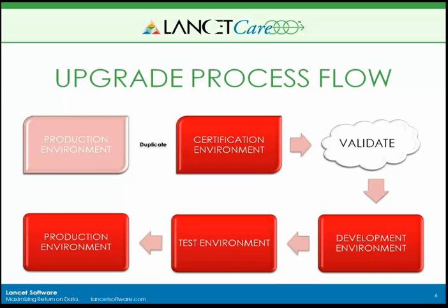So at this point, you need to be in a development freeze where no objects are moving from dev to test to prod. So you think of it as, you upgrade development, and the freeze starts. And then however long it takes to validate the development environment, you step through upgrade test, validate that environment, and then once you upgrade and validate production, then you can come out of that development freeze. Depending on your validation plan, that might be a long time, and you might need to consider how long of a freeze you can afford.